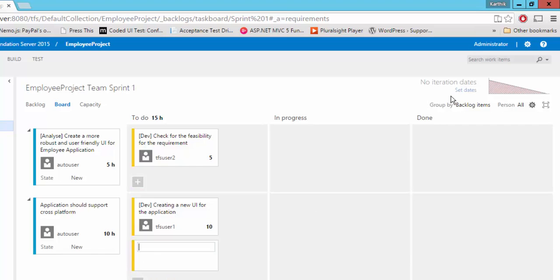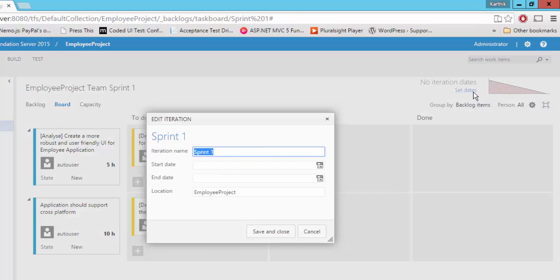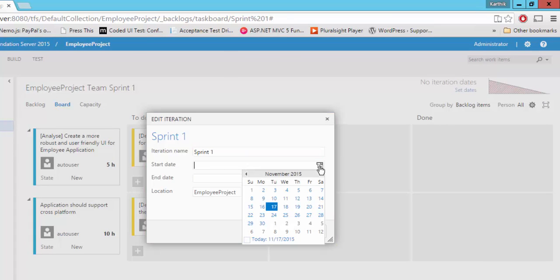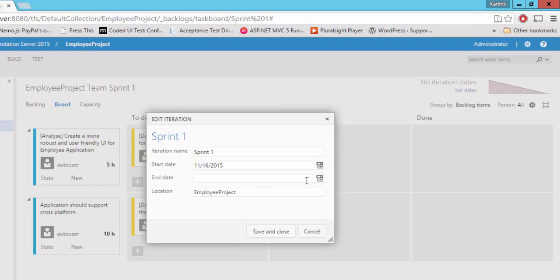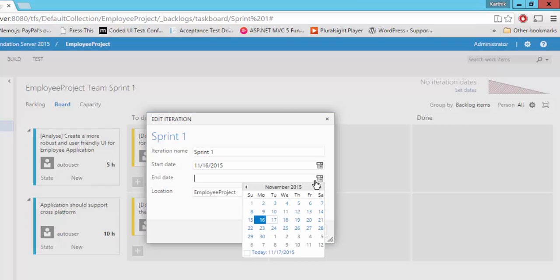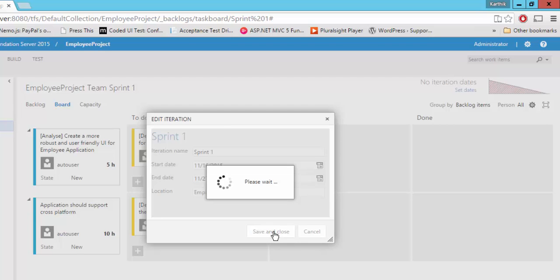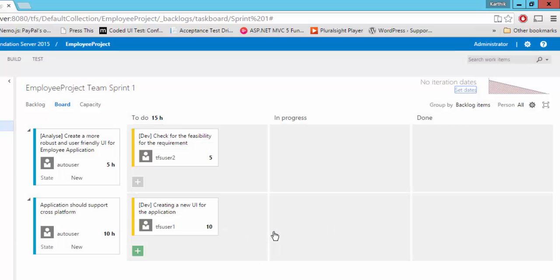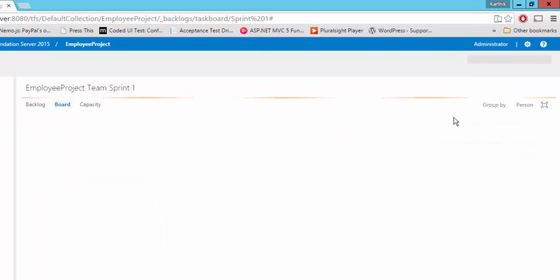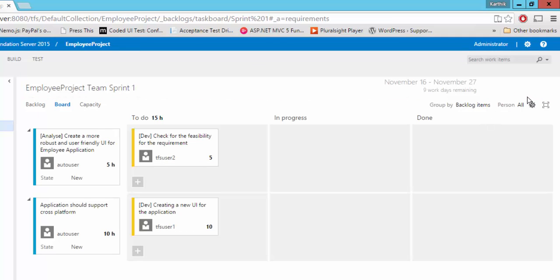And also I have not set any dates here for this particular sprint. When is the beginning date and when is the ending date? If I click that and if I do a start date and the end date, so let's say today is 17 and our sprint is going to be starting from this Monday and it is going to be ending maybe two weeks. So it is going to be ending on Friday of next week. And if I do a save and close and based on the effort, the graph will change.